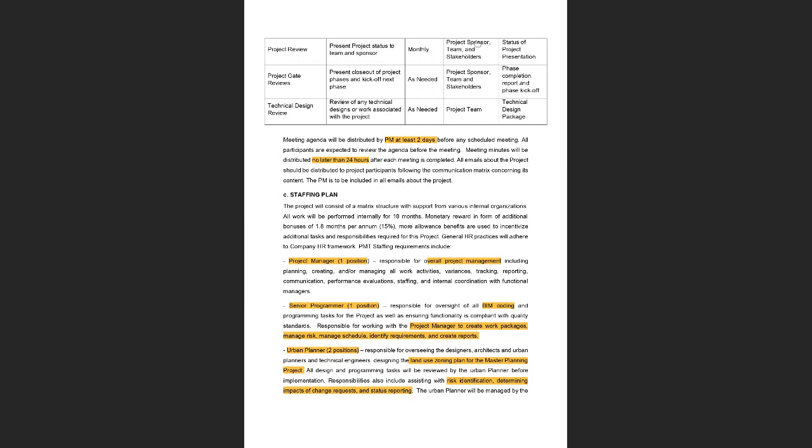And then in the meeting, the minutes of the meeting will be made. Minutes of the meeting is basically writing down the important discussion or important outcomes from the meeting. And then it will be sent to all the people who were present in the meeting no later than 24 hours. So this is how typically it takes place.